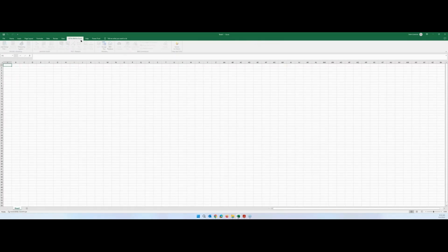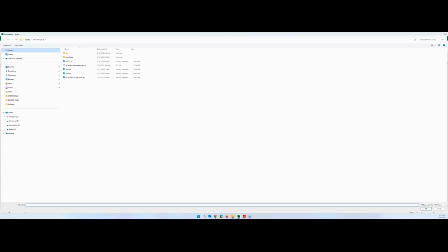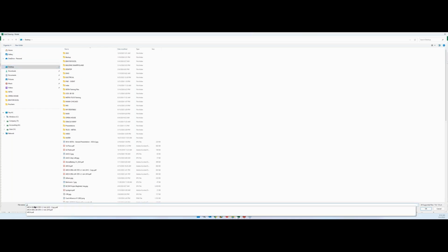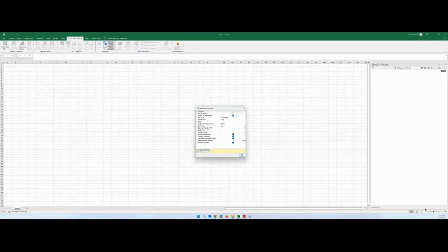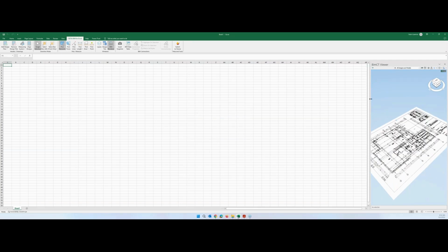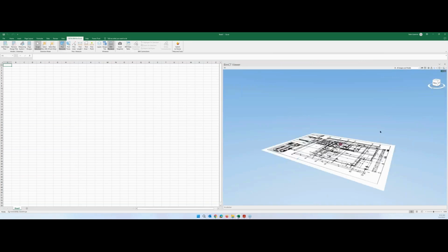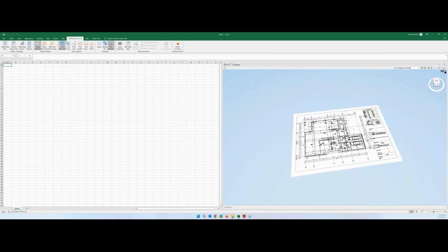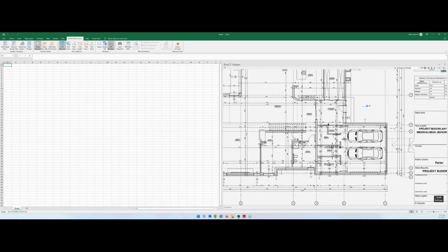And going to ISETIA BIM for Excel, now I am loading here a PDF file. Okay, AutoCAD we can also open, but I'm loading a PDF file on purpose. So I selected the PDF format and loaded it. PDFs are not smart file types, so that's why I give the scale size as 1 in 100, and now I am converting the PDF to dimensions, because generally in the estimation phase we don't have too much 3D. So I open here the PDF format.